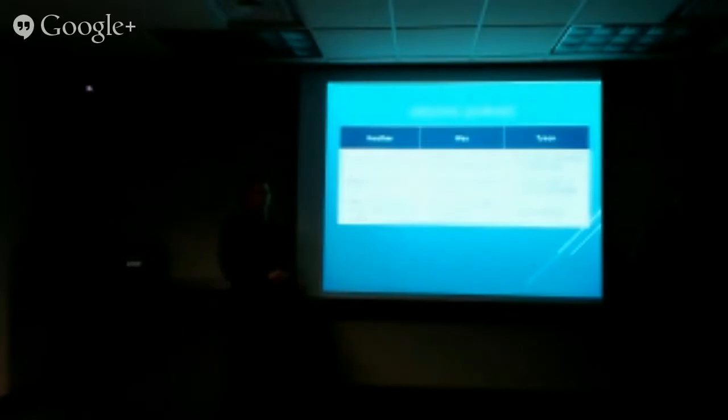Another lesson was that we detail planned the front end of our website before we did the back end, and that ended up helping but not being a huge benefit because we ended up changing the front end as we did the back end anyway. So it would have been nice to have a template, but we didn't need to detail it at the beginning. And then, as Wes mentioned, we learned new technologies of Python and Django, and there were a lot steeper learning curves than we had expected, and so it took a lot of time, but it worked out.